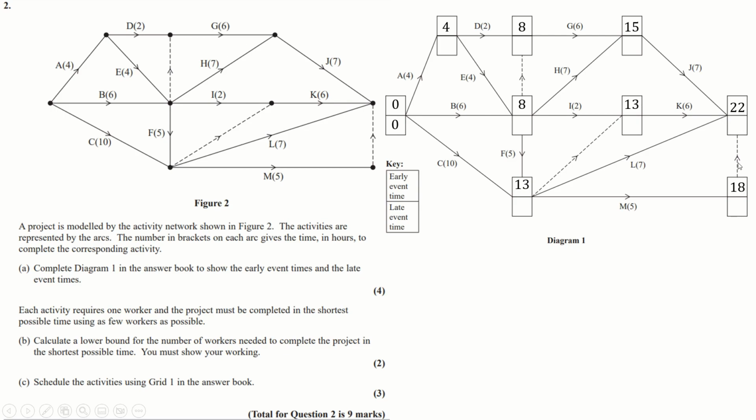I should have filled this one in last, because if this one was bigger, that would have been there as well, but it doesn't really matter. And we kind of knew that this was going to be that. Anyway, from here you work backwards, and this time you choose the smallest thing you can every single time. So start with 22, and then to get to here, well, that costs nothing, so that will just be 22.